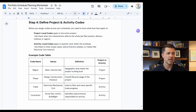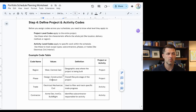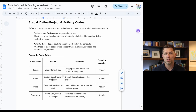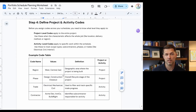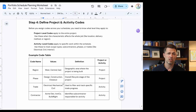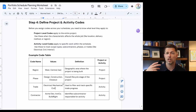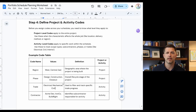Activity-specific codes are applied right to the activity and get into even more detail. In the construction phase, you might want to see different sorts of trades — you could apply those codes and then pull that data out through your portfolio reporting. Maybe you also want to see data by contractor, so you apply the contractor code across different activities in your schedule and extract that out. Let's dive into Primavera P6 and see how all of this standardization works in the schedule.